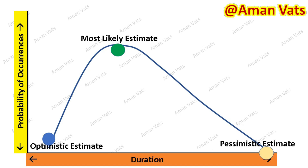Pessimistic is when you have many risk factors and multiple scenarios affecting your project. It is determined based on previous historical records or by considering that resources will not be available and maximum risk factors apply — so pessimistic represents the maximum length you think the project is going to take. So you have three estimates: optimistic, most likely, and pessimistic.